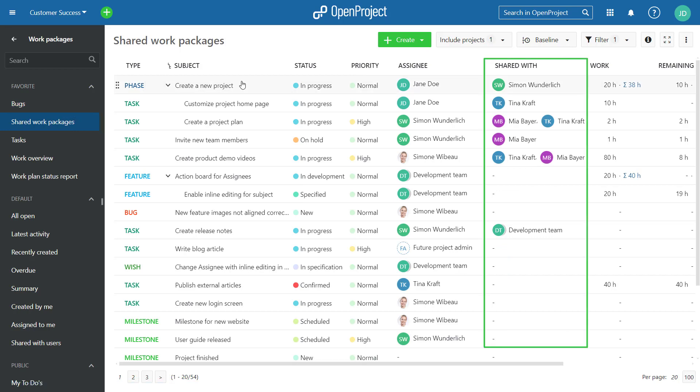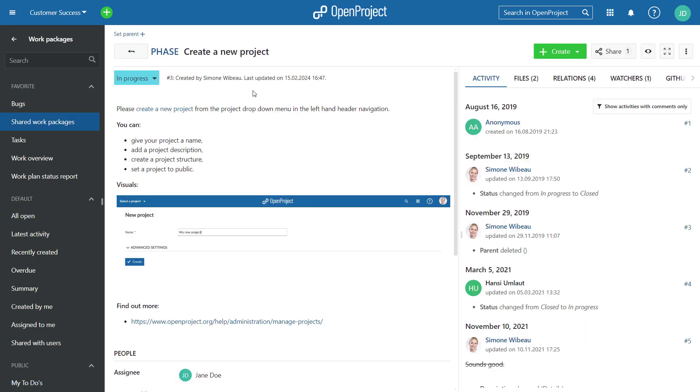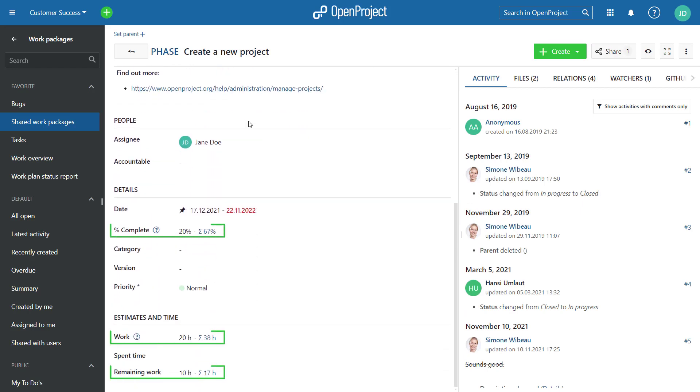Finally, we have further improved the progress reporting for Work Package hierarchies with Open Project 13.3. If you have a Work Package with children, you will also see Total Values for Work, Remaining Work and Percent Complete. The Total Value is composed of all children and the Parent Work Package.